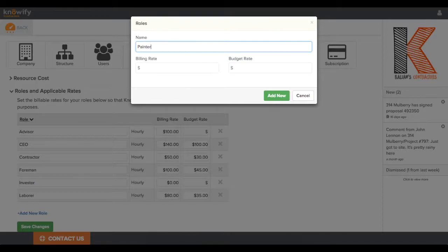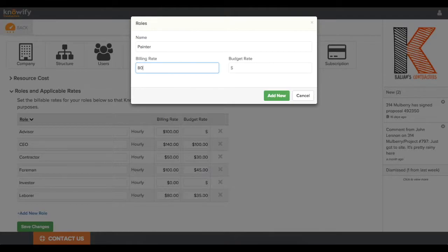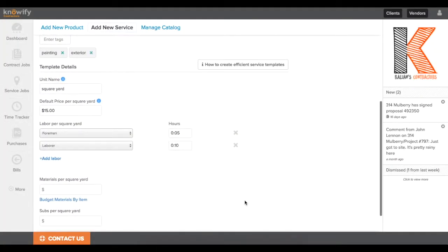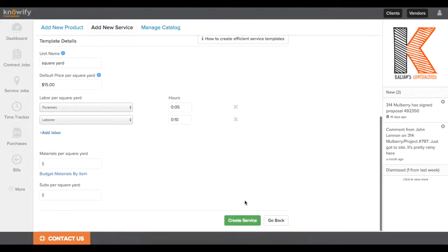You can always add new roles here. Let's say I want to have a painter, and I charge maybe $80 an hour for a painter. Again, this is just for time and materials, but more importantly, I budget $37 an hour, and now I can include that in my service templates. Now, in the same way that I put in a set number of hours of different types of laborer for my budget, I can do this with materials by saying what materials from my catalog that I need per each unit.